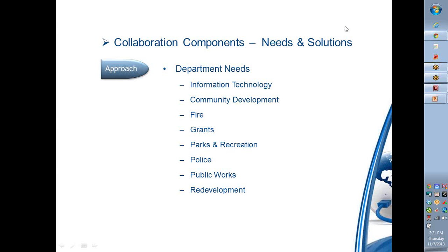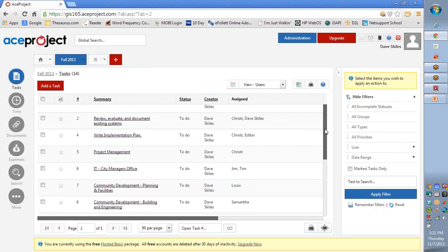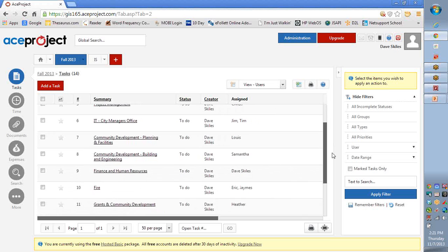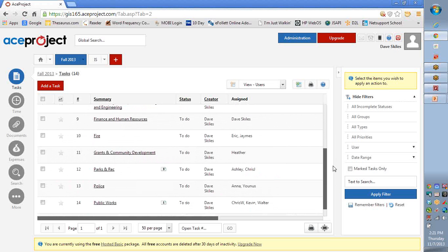The interviewing is going to be the project manager, and we're looking at about 16 hours there, which is essentially 2 days. We're figuring a morning for travel, interviews in the afternoon, interviews the following morning, and then travel back to the office. While the interviews are going on, the information is being continuously sent back to the office, so the two techs are already starting on compiling that information. We've split them up evenly to about 6 hours apiece to do that.